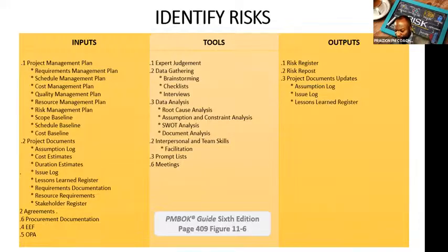Management doesn't want to see the whole risk register. Just give it to them short and sweet. So it says, information in the risk report may include sources of overall project risk, indicating which are the most important drivers of overall project risk exposure, and summary information on identified individual project risk, like the number of identified threats, number of identified opportunities, how they are distributed, the distribution of risks across the categories, metrics, and trends. So short and sweet, high level, a tool that management can use.